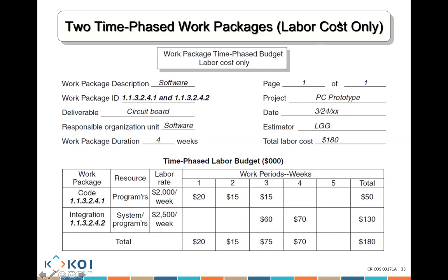Four weeks. So the work package duration is 4 weeks, right? But I'm talking about week 1. If in week 1 I was planning to spend only $20 and I spent $40, does that mean I'm spending more or less? You're spending more. Obviously more. So that could potentially be an issue.